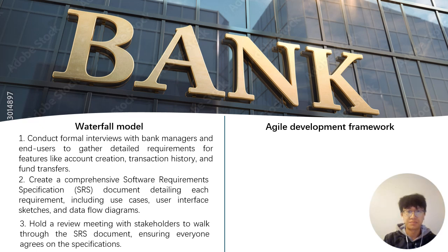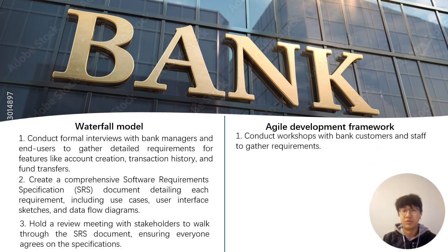mitigation strategies. But what do we need to do if we use the Agile development framework? First, I think we need to conduct workshops with bank customers and staff to gather requirements. We need to write user stories. For instance, as a customer, I want to view my transaction history so that I can track my spending. This is a user story.